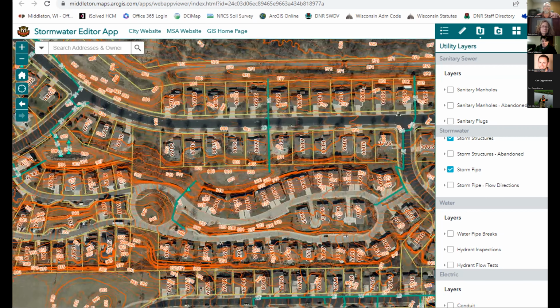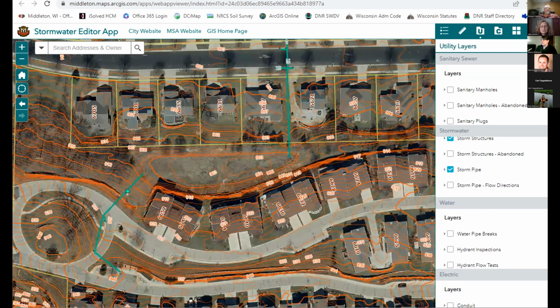And total costs so far, as I understand it, are up to 125 already. Yeah. And the condo association will have to pay the contractor to come back in and make this fix. I'm just curious, given all the work that's been done in this basin, how the poor soil situation could not have been known? Well, I don't have a good answer for that either. My guess is that there's a lens of impermeable soil just below where we investigated to.